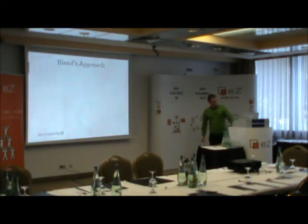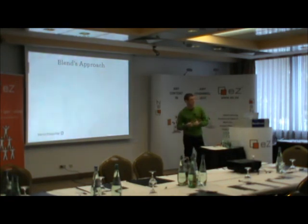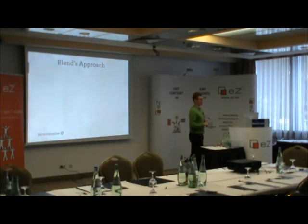So Blend, we started out, most of us were from the financial services industry, where waterfall methodology reigns supreme in project management. So we gather a bunch of requirements for about a month, and then we lock them. And then we do a bunch of estimates for a couple weeks, and then those are locked down. And then we do a bunch of development, and then some months later we launch what we developed, and now we get to gather requirements again because everything was locked down and things change, and that doesn't work.